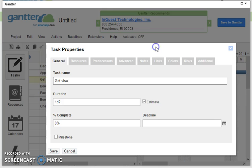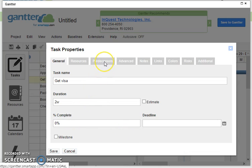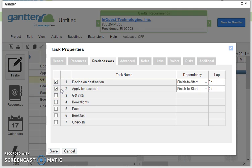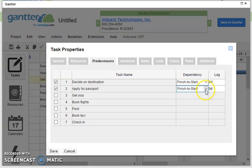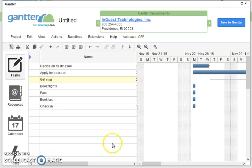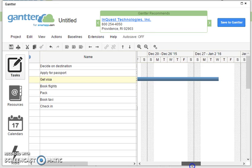Getting a visa is a bit more complicated because it might well take two weeks. There we are, but there's also predecessors, so things that it depends upon in order to happen. So we need to decide on a destination and applied for our passport. Now that's what we want, we want to go from the finish to the start, and perhaps I'm going to leave in there three days just to be a bit secure as a gap between having finished my passport application and starting on the visa. So now when I click Save what you'll see is the Gantt chart has started to arrange itself.